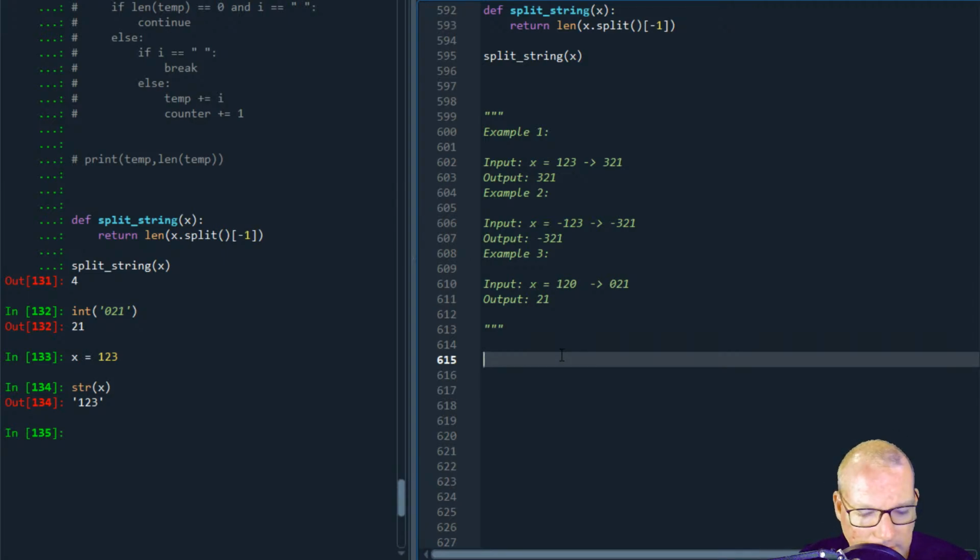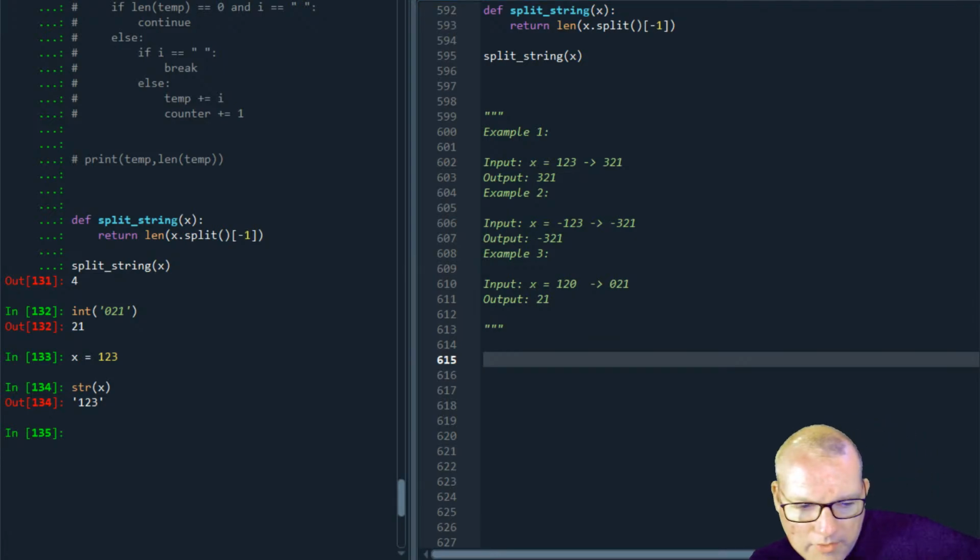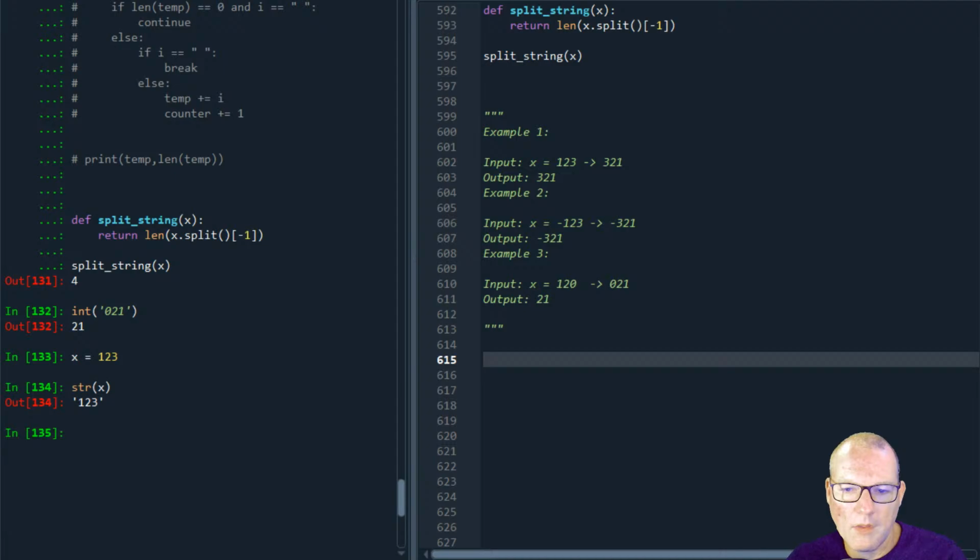But one last thing about the project was after I got done with all the documenting, all the going through of how everything was going to take, then we were able to see that it was going to take about 3 months to do. But we didn't know that until I spent all the time documenting everything. So that's why that is so important.